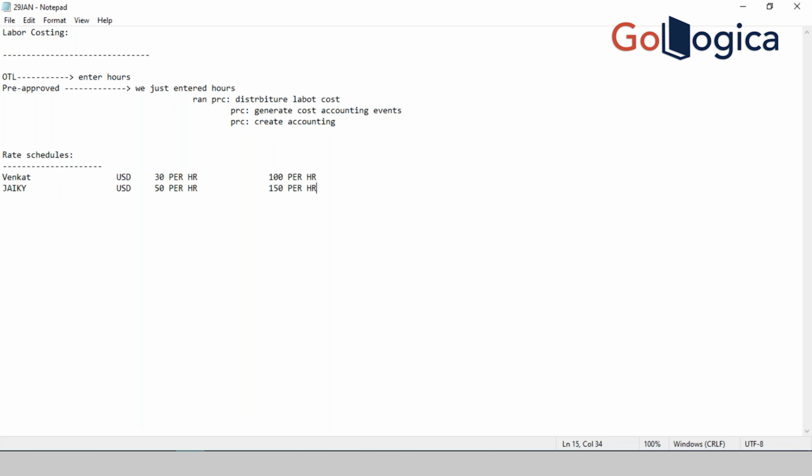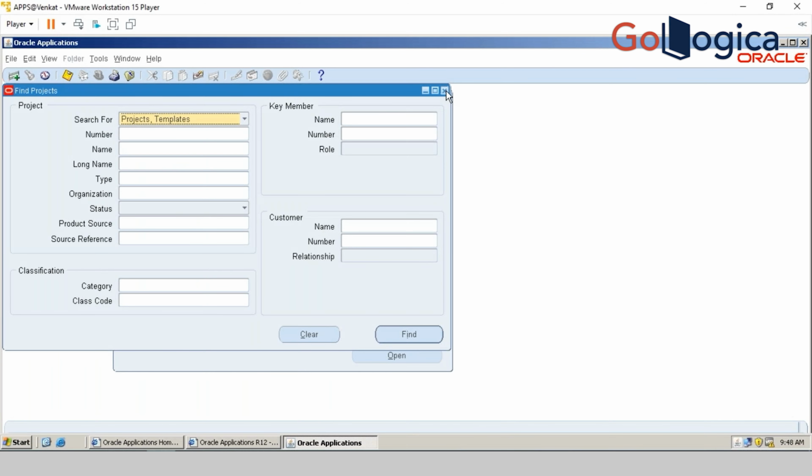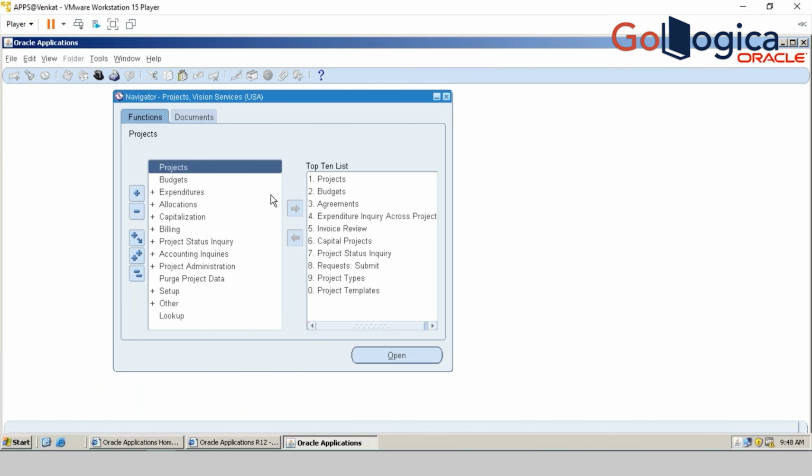They'll charge more to Cisco. They'll issue some different rate, and Cisco will pay the invoices accordingly as per the invoice bill rate. So now the question is, this particular one we are talking about the cost rates, and this particular one we are talking about the bill rates. Now we are in the costing side. Let's talk about this particular one. Whenever you enter any time cards, obviously, the cost rate will be picked up by the system.